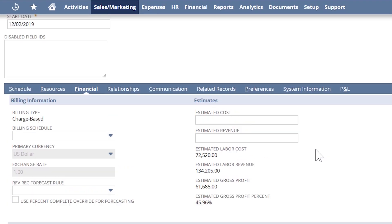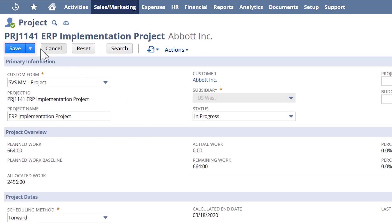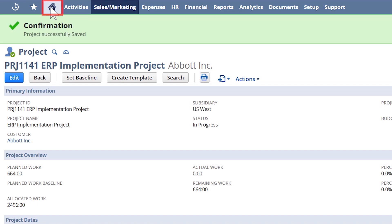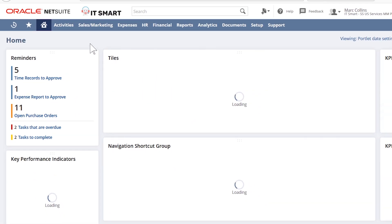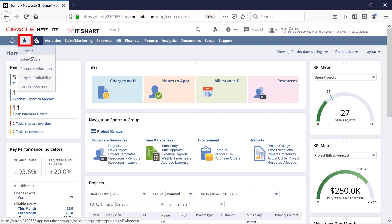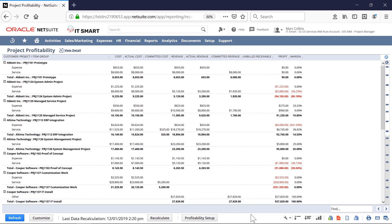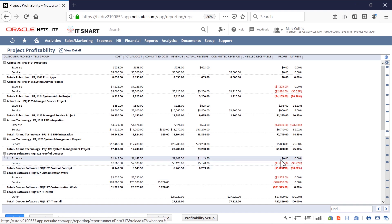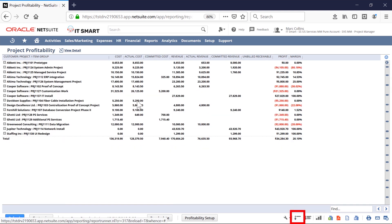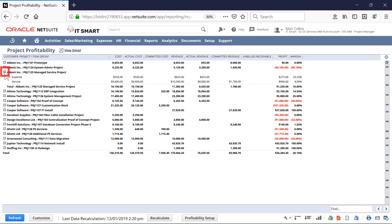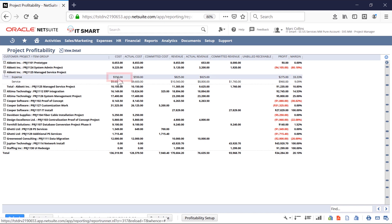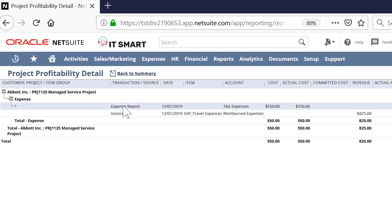Now that I am done confirming all the information that was brought in through my template, I can save this project. I'll be able to monitor the progress of this project through my home dashboard and through NetSuite's out-of-the-box reporting. Let's take a quick look at our project profitability report to see an example of the reports we will use to track this project. I use this report to monitor the overall profitability of my projects, and then collapse, expand, and drill into this report for further review of any time and expenses submitted against each project. This report remains in real-time as hours and expenses are entered and approved.